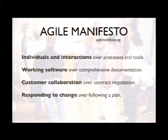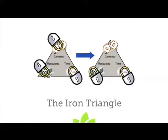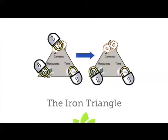Responding to change is more important than following a plan. We can't plan perfectly, but we still have to plan — we just don't need a perfect plan at the beginning. This is the traditional iron triangle of projects: we can fix contents, resources, and time, with quality in the middle. If we try to fix all three, quality is the one that ends up being flexible. Instead of sacrificing quality, make the contents flexible — it's much better to be flexible on scope than on resources or time.